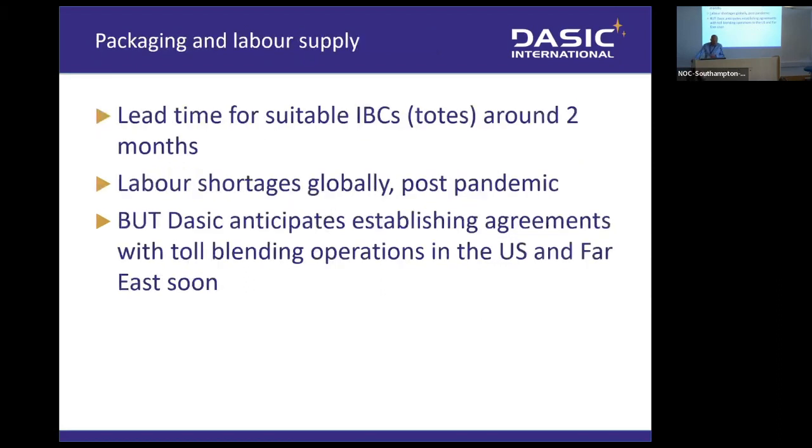And finally, just to talk about packaging, Dave Reddington talked about the EVOH IBCs, or totes as the Americans know them. We're talking about 2 months lead time for enough IBCs to produce 5,000 cubic meters of Corexit 9500. Then there's manufacture. Dave's slide showed that we could produce 108 IBCs a day once we get ramped up. That's on the assumption we can get the labour to work 24 hours a day to do that. Quite frankly, at the moment, I think we're going to struggle.